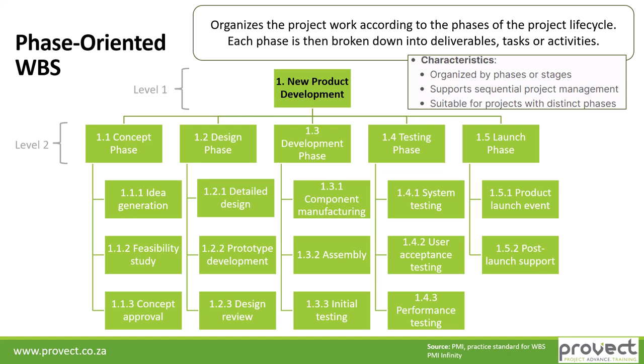The level 2 phases continue with the design phase, development phase, testing phase, and then the launching phase. Then in level 3, under our concept phase, we've got idea generation, feasibility study, and concept approval.